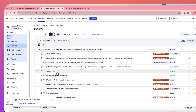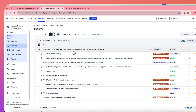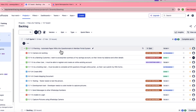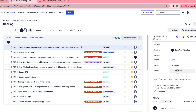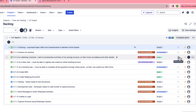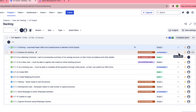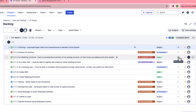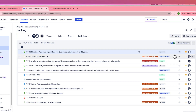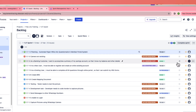When creating user stories you won't always know how long each will take — that's why we have story points. In Jira, there is a story points field. Story points are assigned in a Fibonacci series: 1, 2, 3, 5, 8, 13. A one-pointer takes less time, a three-pointer is more complex, an eight-pointer is very complex and will take a lot of time.